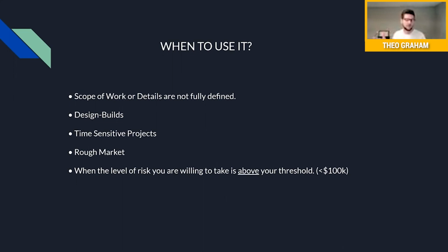You get into maybe a renovation that's above that. And for me, speaking personally, after $100,000, there are just a few too many moving parts or selections not made, that I could then easily switch and say, for this project, I'm going to propose a cost plus model. And they go, what's that? And then I have this conversation with them and they say, oh, that sounds fair. Because again, it's shared risk at that point. If anything goes wrong or anything changes, you're allowed to have open communication with the client about changes that are foreseen. So again, it's really about mitigating and monitoring your own risk levels. And we're going to segue into when not to use it next.